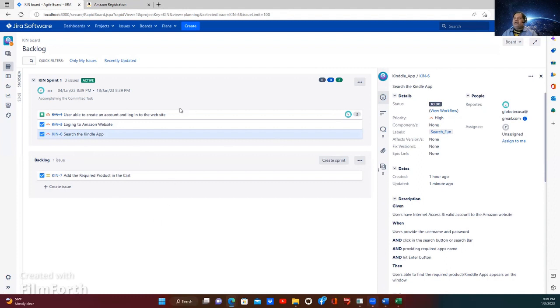It's not that you say, okay, next sprint team capability is 15, I'll stretch a little bit and make it 18, and then we add another 3 points. Now it's 21, which is out of capacity of 15. So first you need to see whether you have any carryover from the previous sprint. Keeping that in mind, you need to arrange your next sprint based on your team capacity and time.